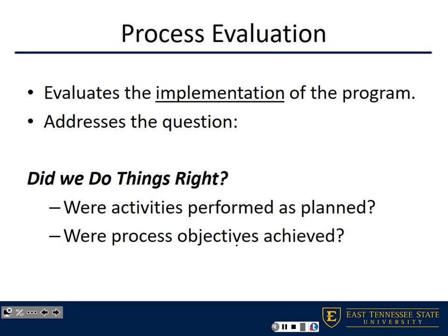Okay? Because if you're not engaging in process evaluation, one year will pass and you'll realize at the end of the year that you've really only achieved 10 or 20% of what was in your action plan. And that's too late to make that realization. So really, process evaluation should occur on an ongoing basis. Okay? With my project teams, with my research teams, and I currently have 5 different research teams, depending on the project, we have bi-weekly meetings with each project team.